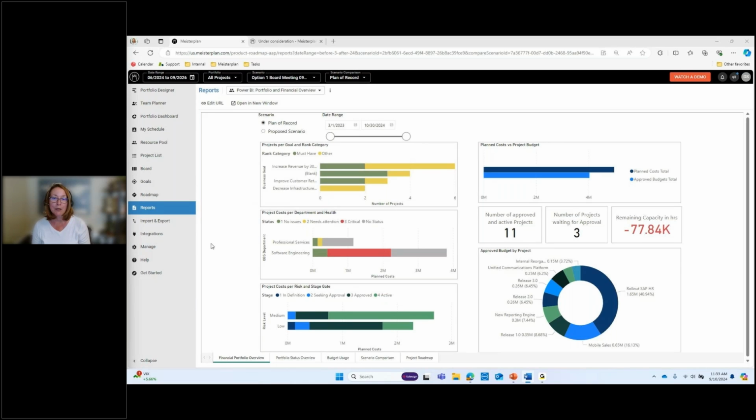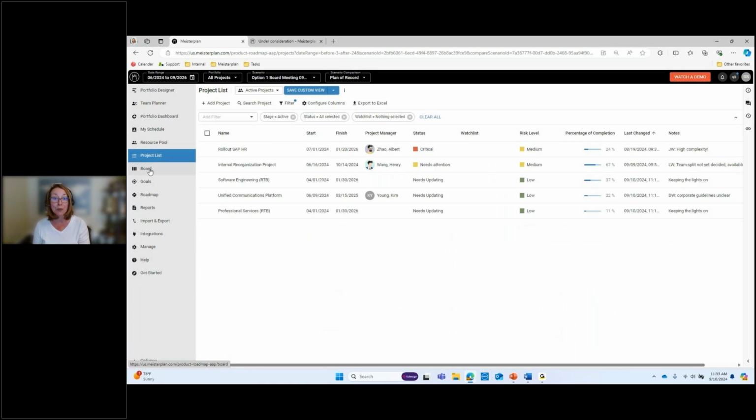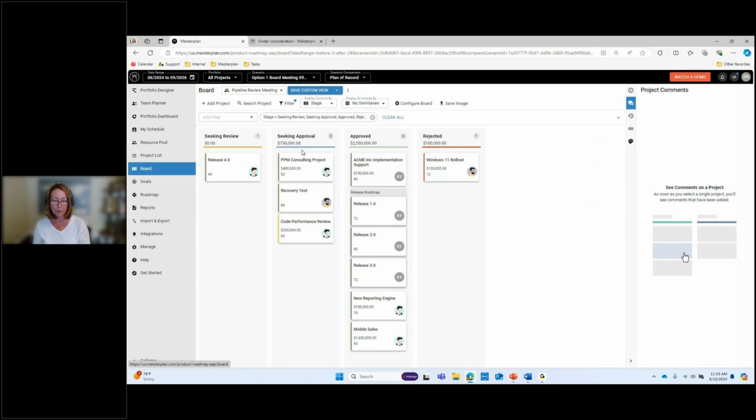All right. So getting ready for the board meeting is a few different steps. Just in summary, you're looking for critical issues. You're usually doing that in project list. You're looking for new projects to talk about. You're seeing that in the board view. You're creating a scenario to make sure that you're proposing something timing-wise that would fit based on the capacity you have, or indicate there will be a budget need. So all of that is some tips on getting ready for the board meeting.